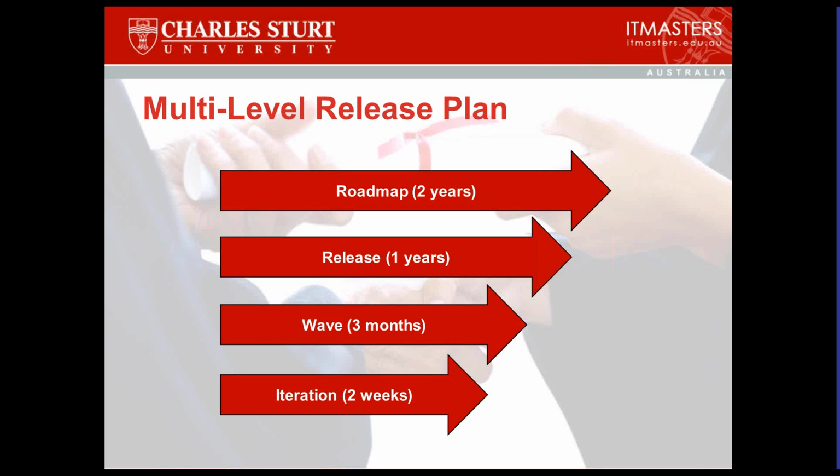They line up. So the iteration is where we sit down at the planning meeting and say, right, what are we going to get done in this iteration? We know strategically what we're going to need to get done in the entire wave, and we know which of those we want to get done in this iteration. We've got a rough idea of what we might think about for the next iteration because it's going to relate to it, but we're not going to plan that yet. We're only going to plan this iteration now. We're making just-in-time decisions.